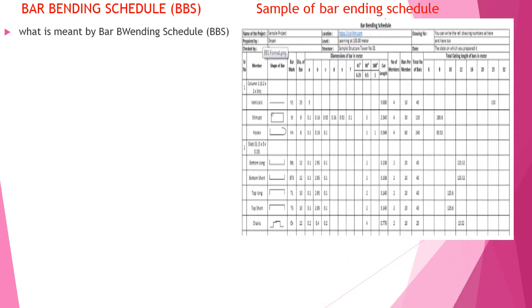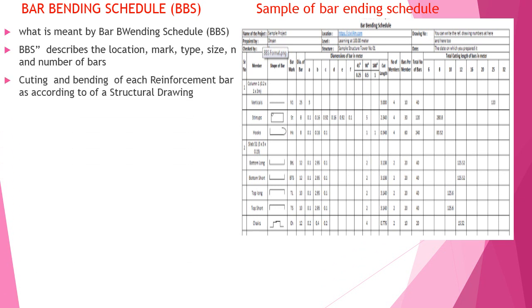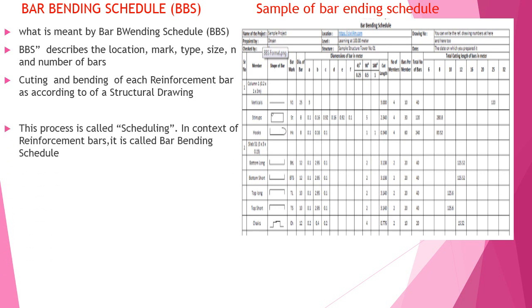Refer to the image which indicates how the bar bending schedule has to be prepared in an Excel format. BBS is nothing else but identifying the location of the bar, mark of the bar, type, size, etc. This can be derived from the structural drawing. This process is also called scheduling.